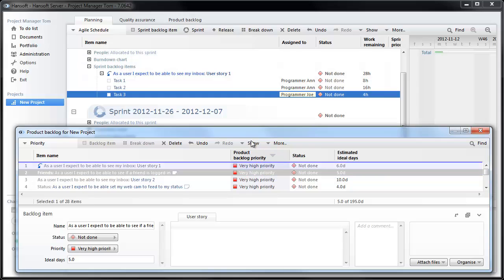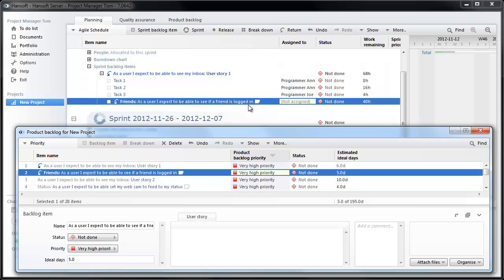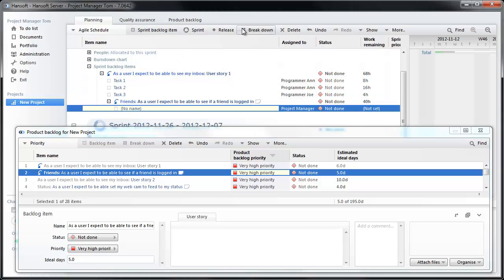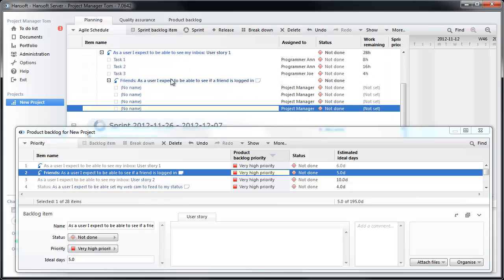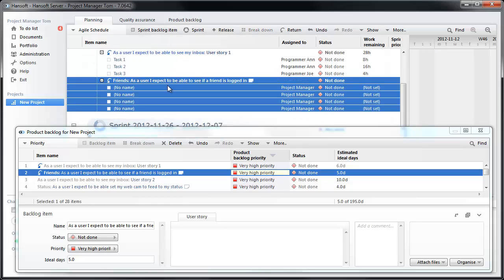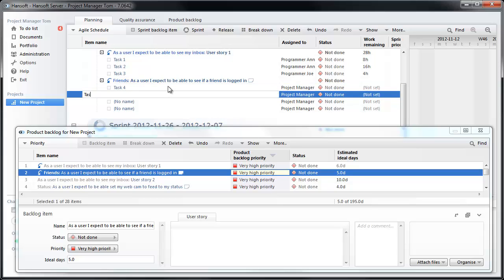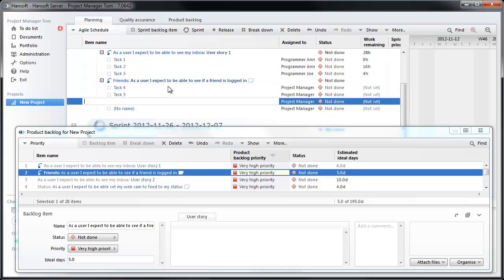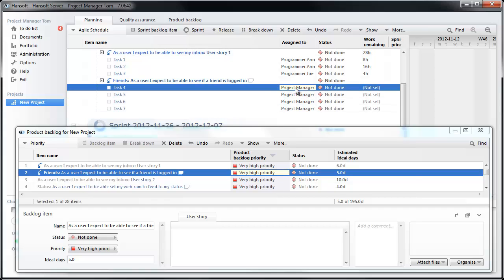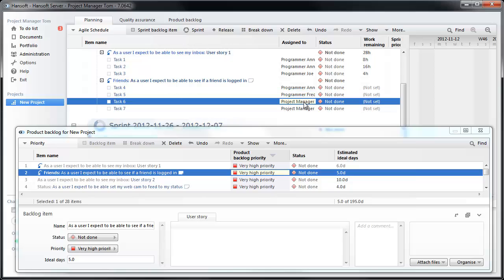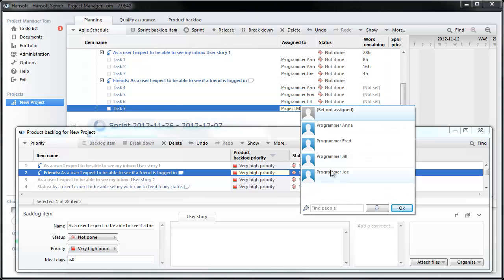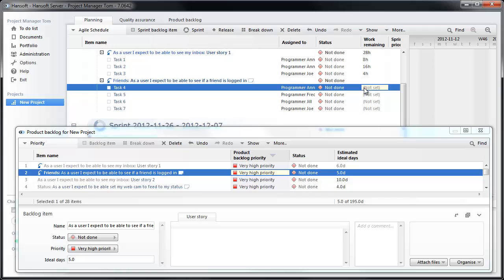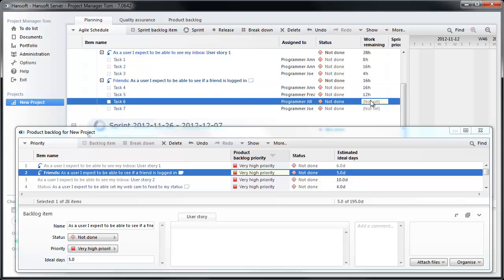And then we're going to pull the next item in. Once again, the team is going to be asked, can we do this? We're then going to, once again, break this down into a number of tasks. I'm going to add task four, task five, task six, task seven. Once again, we're going to assign these like this and do our rough work remaining estimates.